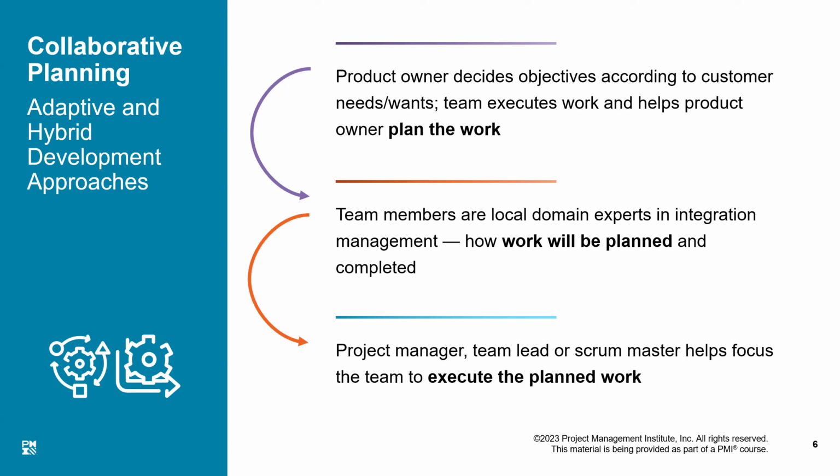So they are allowed to change, whereas only the requirements which we are working on in one iteration are frozen, and you know, our iteration could be 1 to 4 weeks. So if your iteration is 2 weeks long and you have picked up 10 items to do in that iteration, we just try to freeze that. We say nobody can change these 10 requirements while we are doing them. While in this process, the customer is free to change any other requirement which we have not yet started. Do you agree with me?